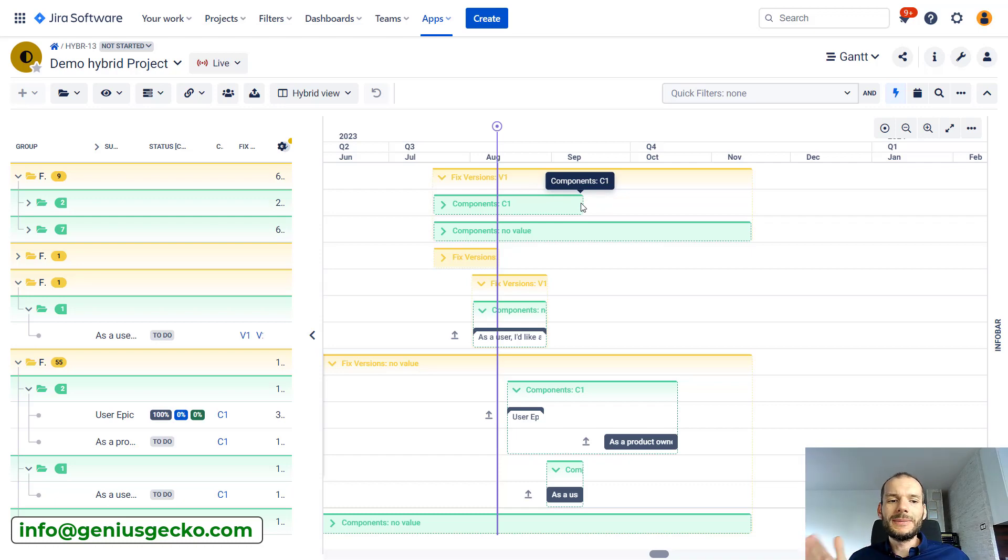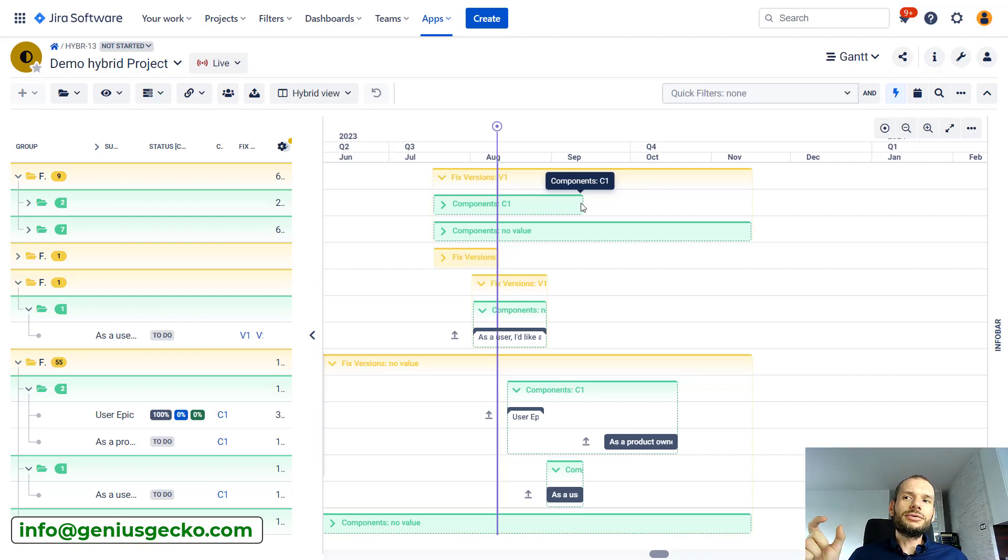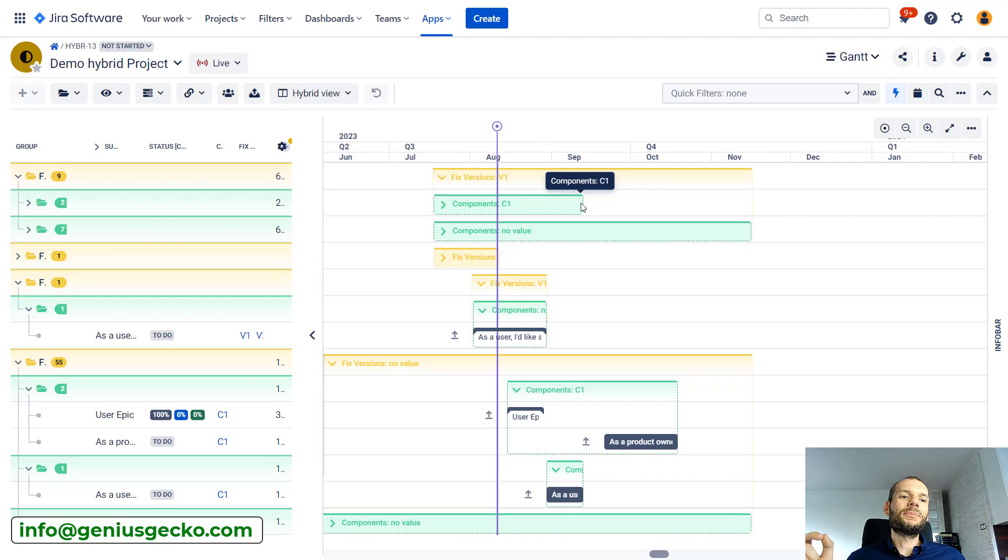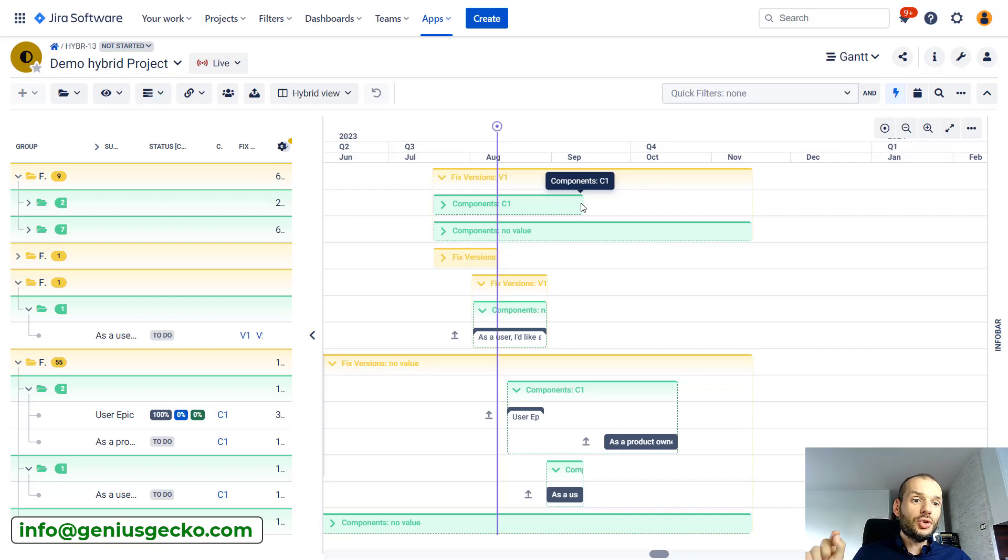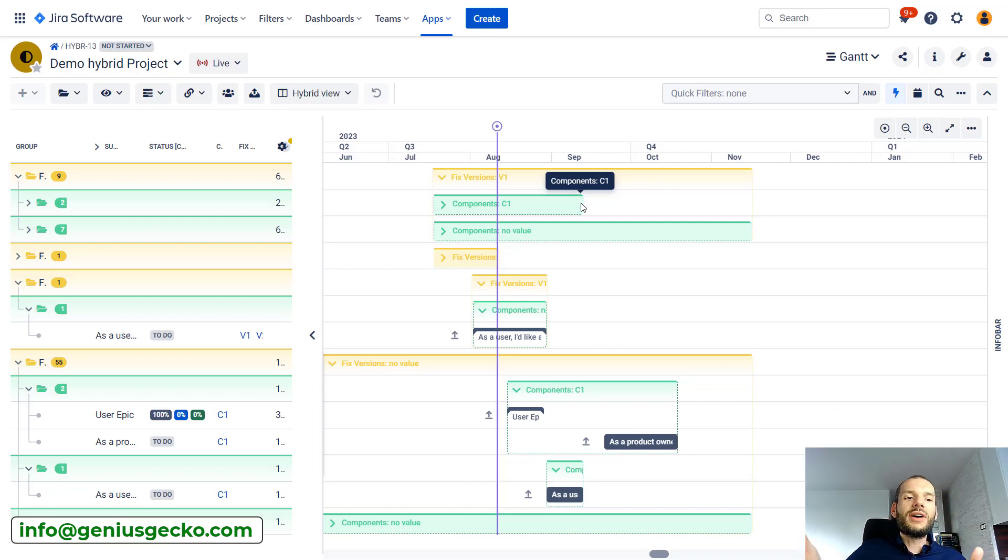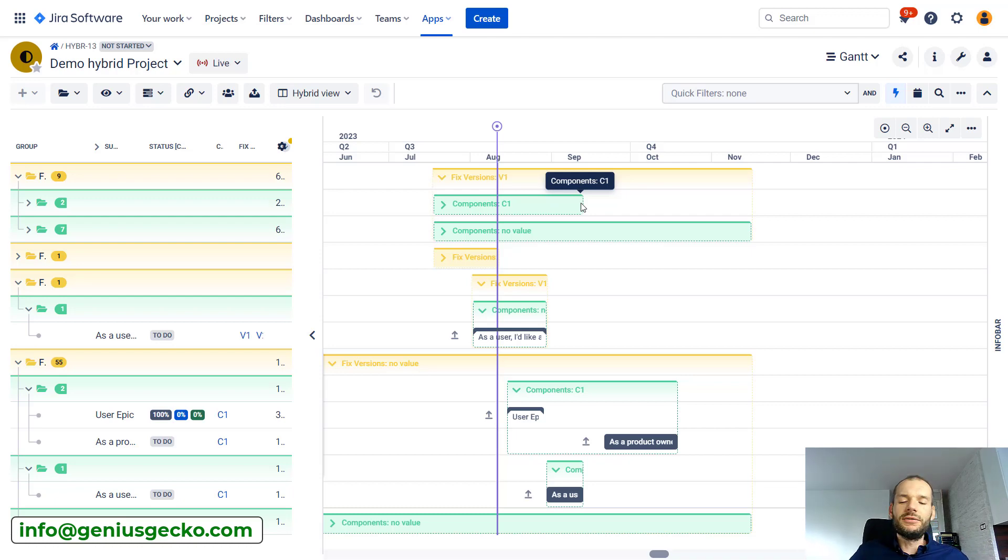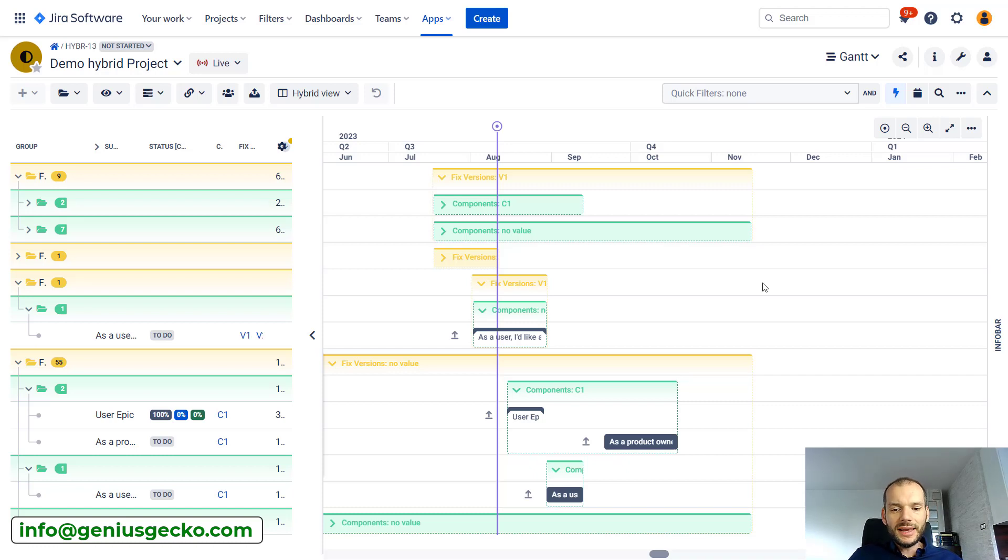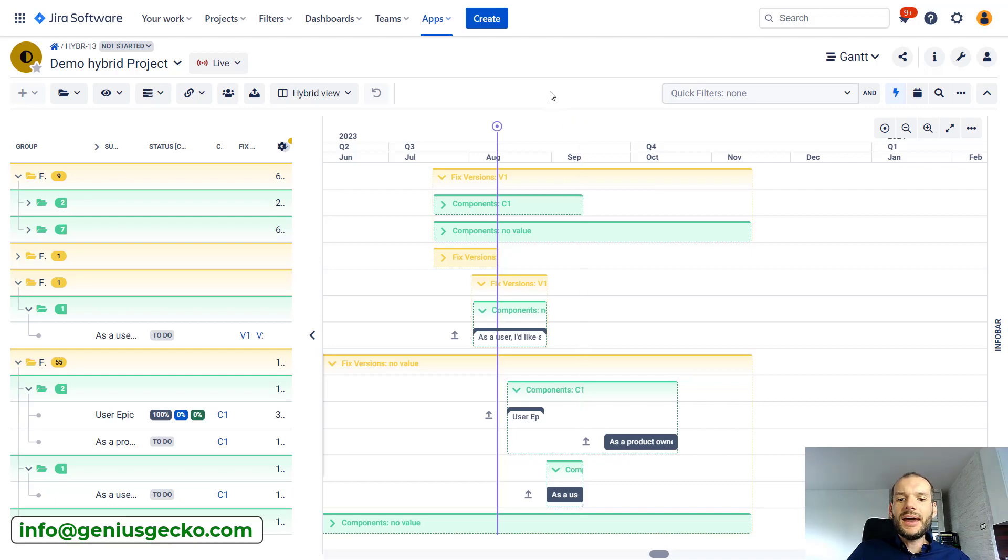We could have, for example, the same if you have a case where some external providers are delivering work for you. You could put that information on the issue in a dedicated field, do the grouping by that field, and then you would know from when to when these providers are needed, when they will be working for you, and when they are no longer involved in the project.